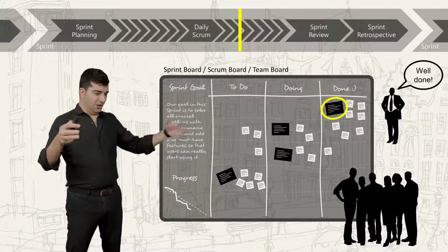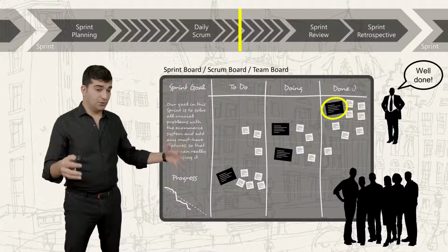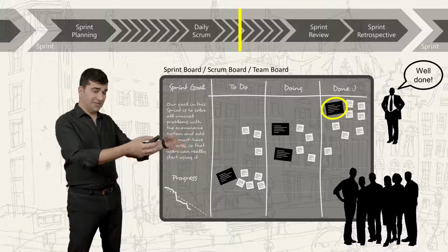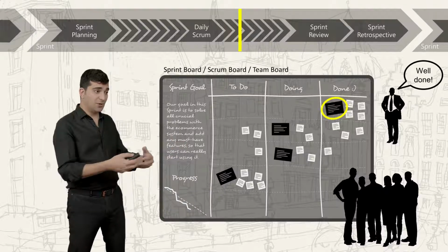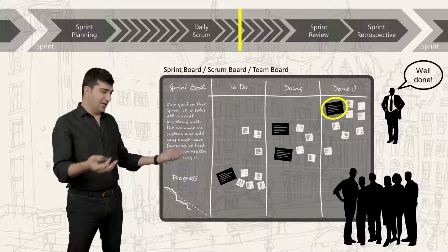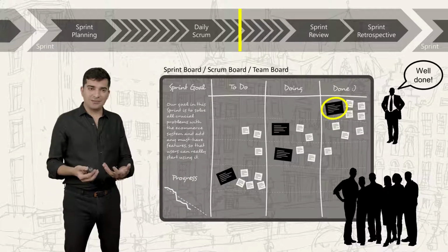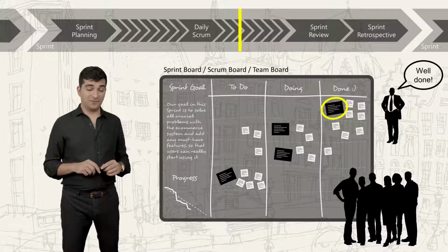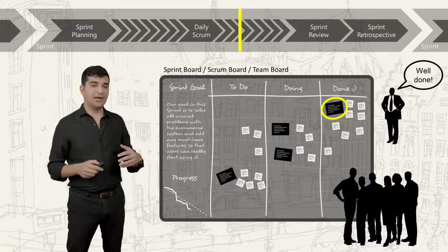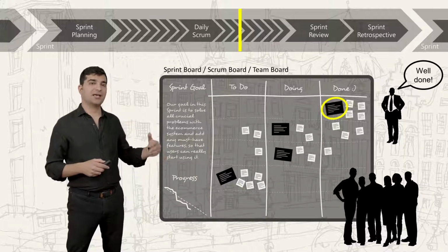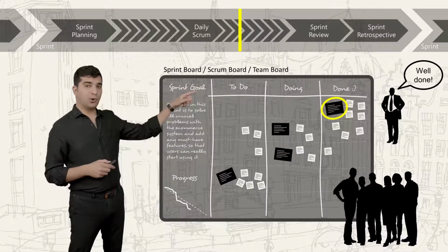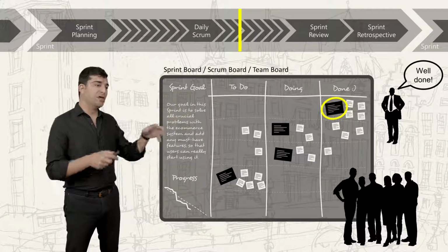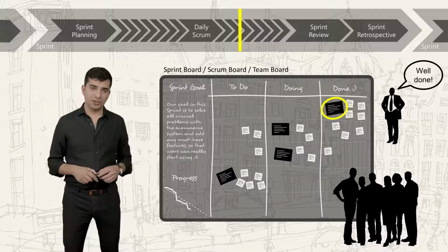You will have a big pool of items that you call done, but after a while when you do the user acceptance testing, you will see that many of them are not accepted. So you have to work on them again, and it won't be organized. You won't know what's happening in the project, and also it will create problems for your feedback loops. That's why we will do the user acceptance testing as soon as possible. And at that point, when they call you, the product owner, to come and check the item with them, the user acceptance testing is already done.